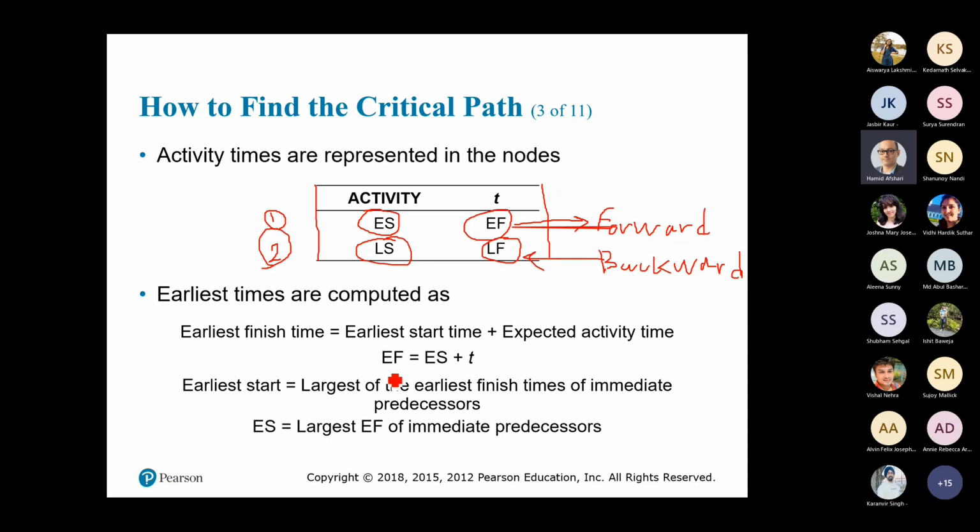So if the earliest start of an activity is 6 p.m. and it takes 45 minutes, when is the earliest finish of the activity? 6:45.